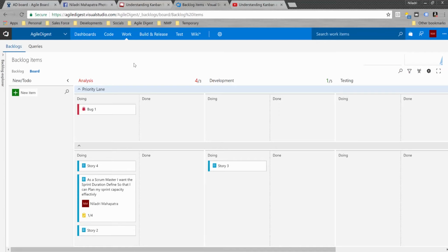Now there are other areas where you can create lanes to differentiate the categories of stories. There are 4 different categories of requests or stories that you can work on based on their nature. One, the priority lane, anything that's high priority. You can also create another category of story that we call intangible. These are any stories that are maintenance related, not giving an immediate benefit or value addition to the customer, but required for future development or future performance issues. You can create that kind of category.